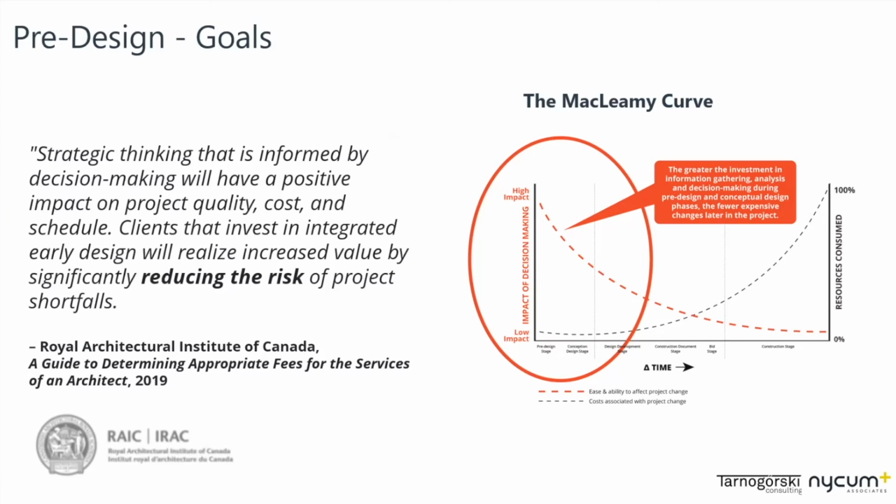But as you go further along and you get more and more information, more compiled work and compiled layered decisions, that cost will increase, and it increases not linearly, it increases exponentially. So putting in the time right at the start to really nail down, for instance, the project charter can pay dividends, especially when approaching politicians or other developers for partnerships, or just moving forward with your own initiative and using the funding that you have acquired strategically. The goal is to have a firm foundation and decrease the costs that you're spending on changes in the future.